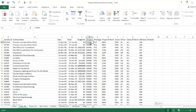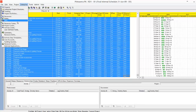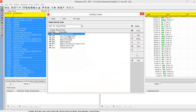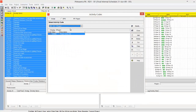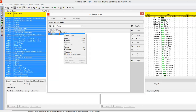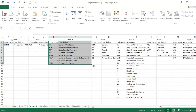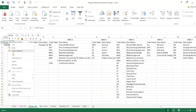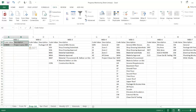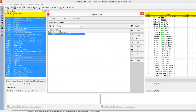What the program will show now is the code, but instead I want to show the description of the code. So from Primavera, I'll go to activity codes starting from the first level — right-click, copy — then go to Excel, find the drop list under WPS one, right-click and paste.